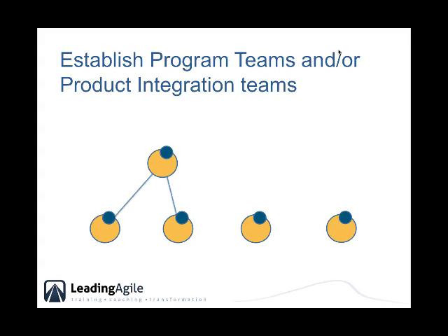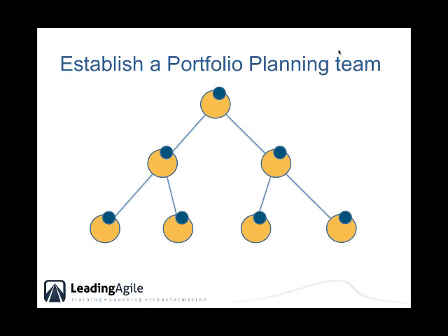I wish I had a whole hour to talk about this one concept. But very often I talk about this idea of product owner teams to be able to take product vision and do the story mapping and the initial decomposition and to wrestle down some of the higher, stickier architectural issues that span different teams. And then they collectively, in effect, form kind of a product council or something for the teams that are up underneath them. So we start looking for structures within the organization where it makes sense to have appropriate aggregate points, and then portfolio planning at the top.